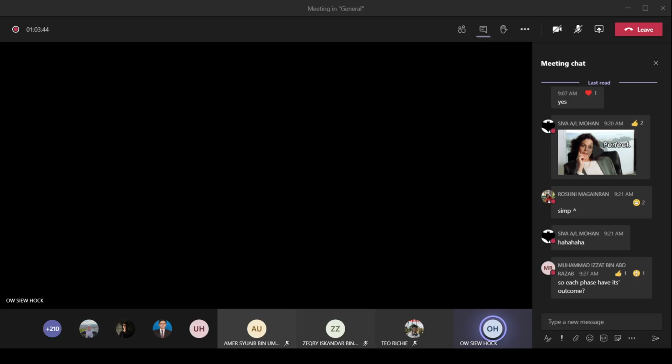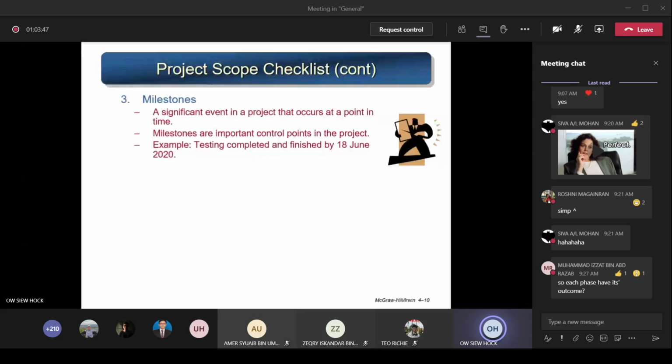Okay, next. After you've done this, the next one is called milestones. So what is this term called milestones? It is a significant event in a project that occurs at a particular point in time. So you must see the difference. Milestones are important control points in the project. For example, how you define your milestones: testing completed and finished by 18 June 2020. That means that particular point in time, only that point. So on 18 June 2020, testing completed.